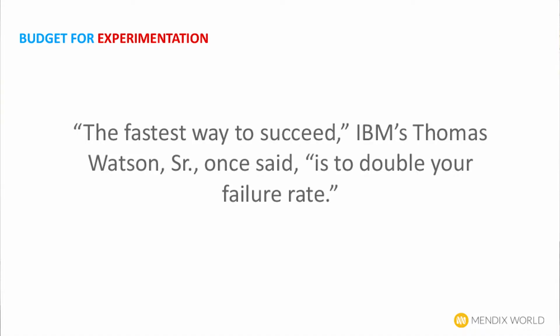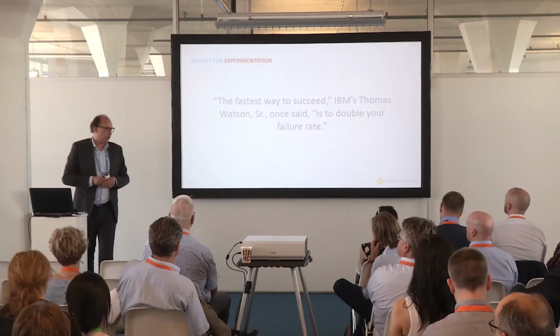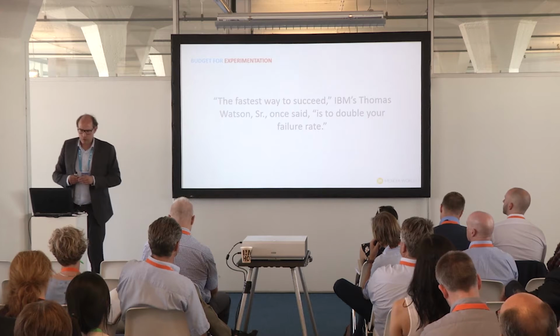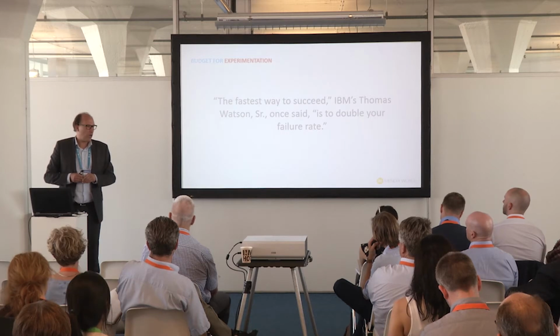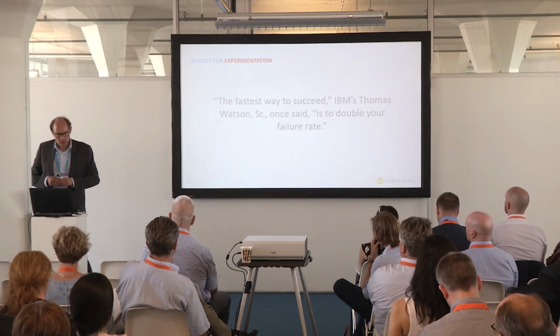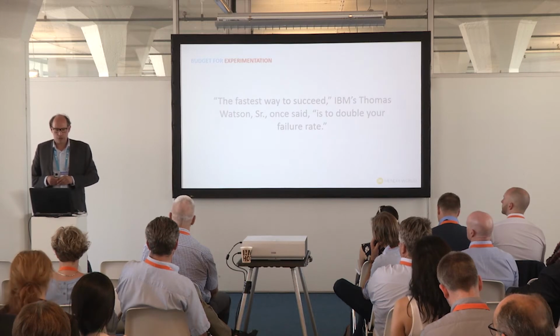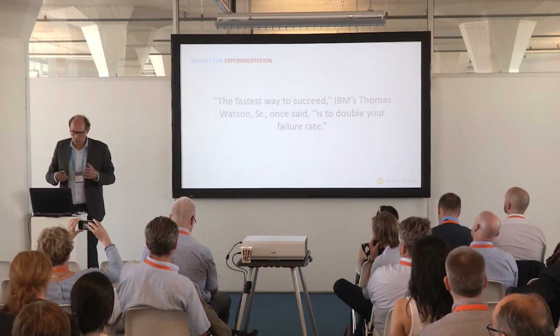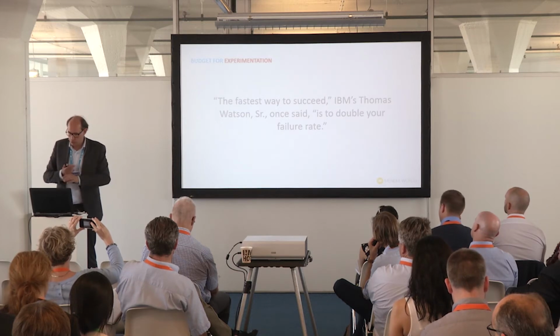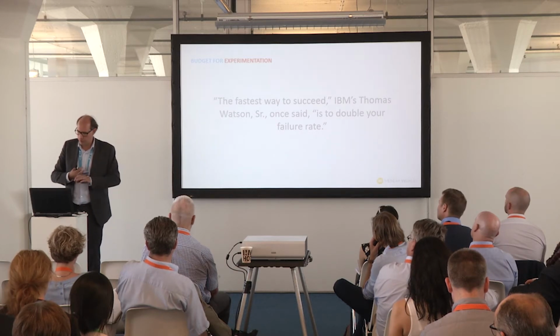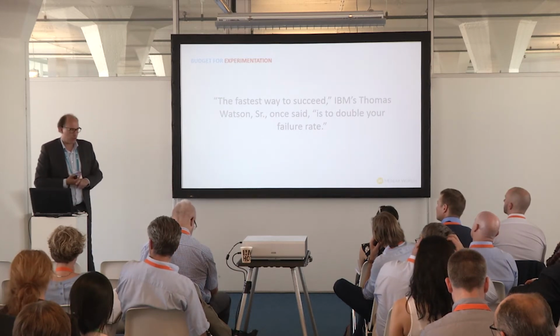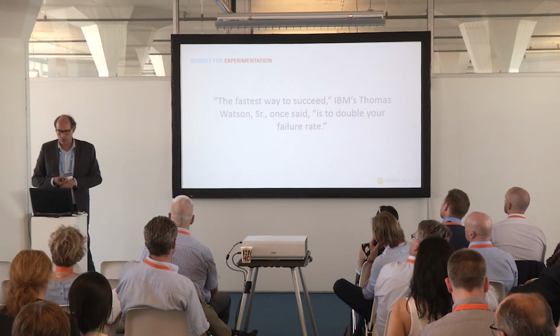Another option that you have is experimentation. What I see is that it is something a lot of companies are very afraid of. Digital experimentation allows customers to fail fast and learn a lot. So one of the things we need to think about is how you can scope experiments and make the risks as small as possible. One of the things you can do there is make sure you've got the right success criteria beforehand, that you run experiments in the field with existing and real customers, but also that you capture key insights and that you monetize on the value of the lessons learned.